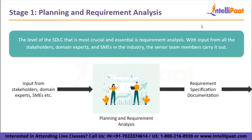About stage one: the most crucial level of SDLC is requirement analysis. With input from all stakeholders, domain experts, and SMEs in the industry, the senior team members carry it out. At this point, planning is also done for quality assurance requirements and identification of project-related risks. A meeting is scheduled with the client by the business analyst and project manager to obtain all necessary information — such as what the customer wants to construct, who will be the end user, and what the product's goal is.